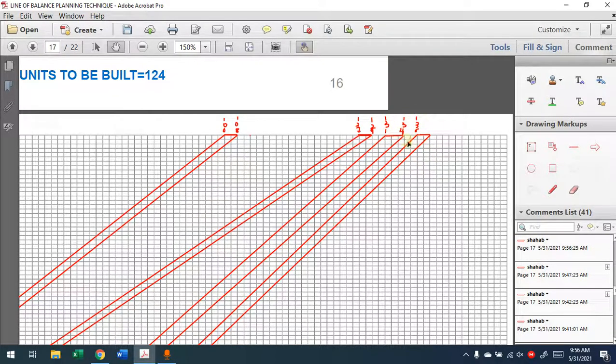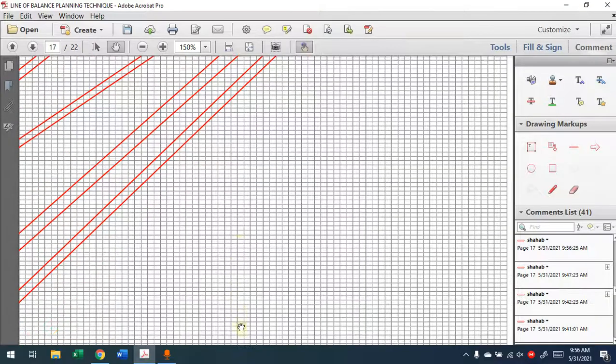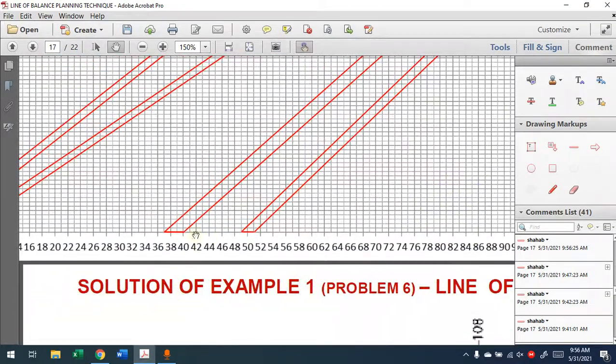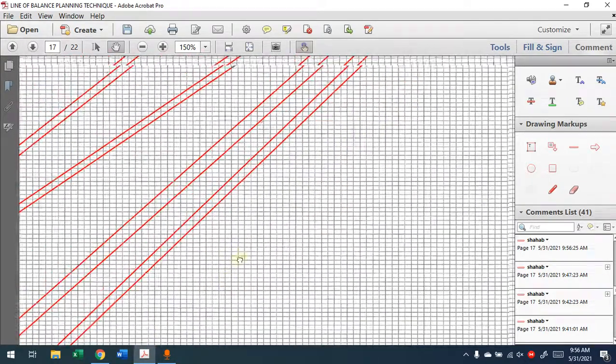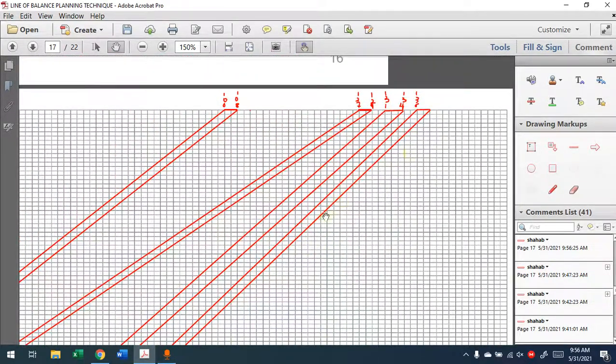Look, do I have 2 days of buffer at the bottom? Yes, more than 2 days. Why do I know this one will be correct? Because by comparing the natural rate, I know that if I start from the top, I'll get the correct drawing.